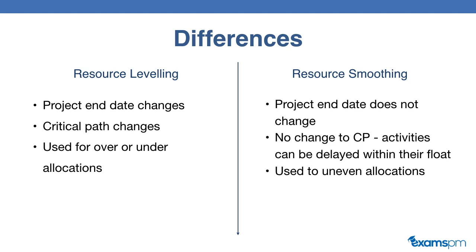In comparison, in resource smoothing, the end date of the activities doesn't change. Given the dates that you have, you're just readjusting the schedule a little bit so that the amount of work the resource has to do week by week is roughly the same. There's no change to the critical path, and activities can be delayed based on how much float you have in that specific activity. It is usually used to even out uneven allocations. So the major difference is: resource leveling changes the end date, while resource smoothing does not change the end date — you're just adjusting uneven allocations.